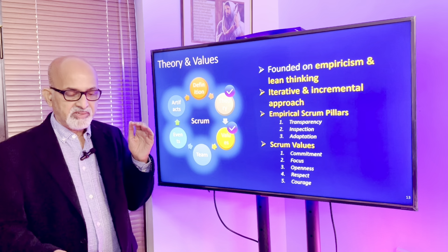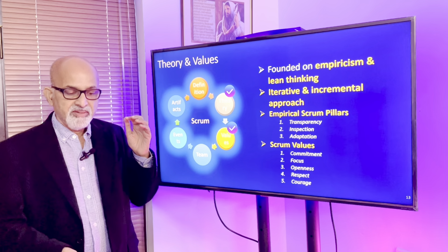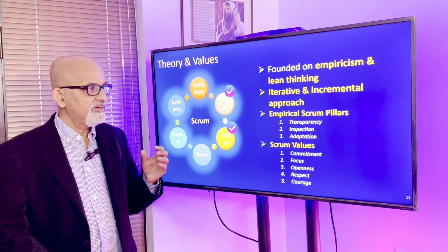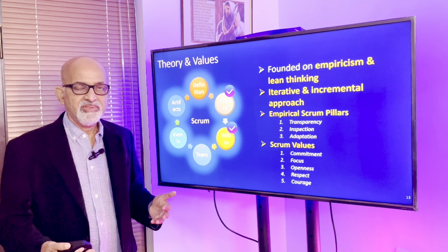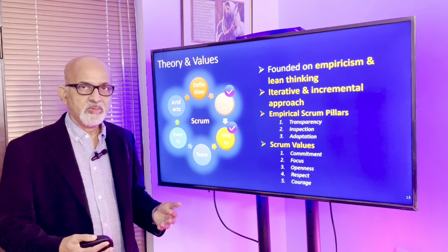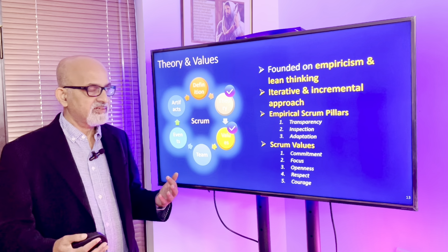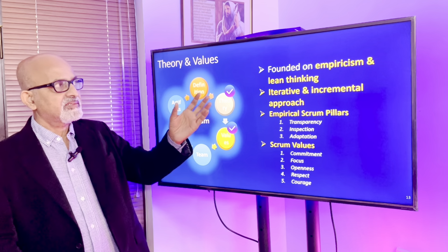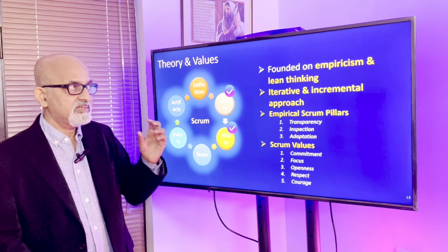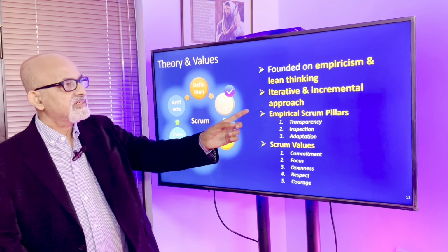For example, the product backlog: if we add items, they must be estimated, and if you add up all the features, we should have some mechanism to say this is the total weightage for all the features. Out of that, at any point in time, we should know how much is done, how much is yet to be done, how much is work in progress, and to complete the balance, how much more effort is required, and is there any risk involved? So everything is driven by data. Scrum is a highly disciplined framework, which is simple, yet very disciplined. And it is iterative and incremental.